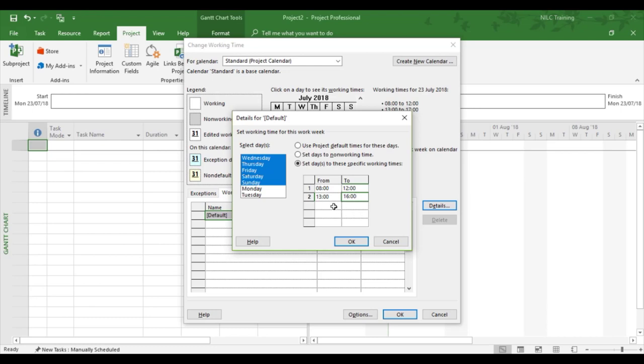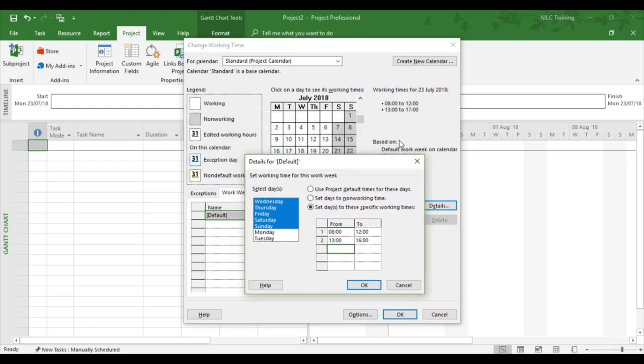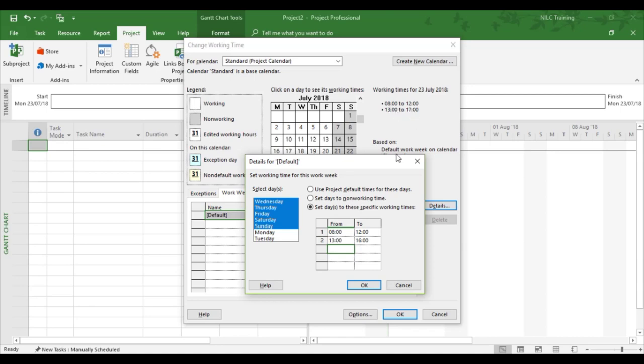So I've now changed the working time from 8 hours to 7 hours. That's the way I'm getting project to calculate itself. Now what you'll notice when I click OK, the timings will change when I click on another date. So I'll need to click on another date first, but then you'll see the timings change. So it's not going to be 8 to 12 and 1 to 5, it's going to be 8 to 12, 1 to 4. That's what's going to happen when I click OK and click on a different date.